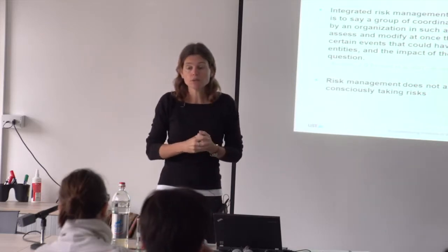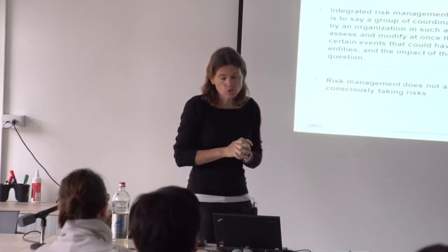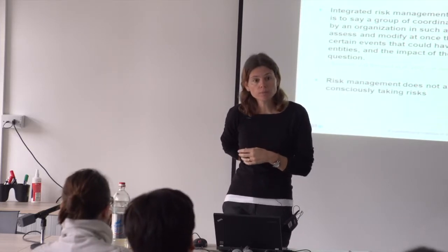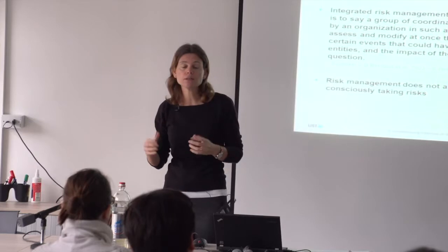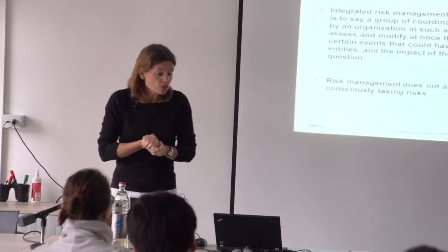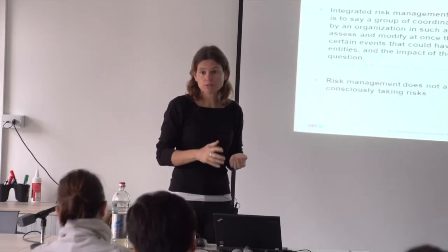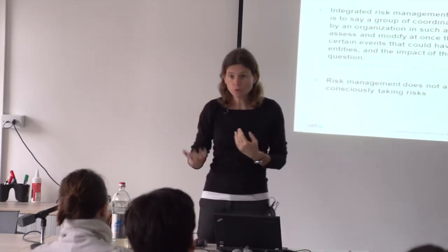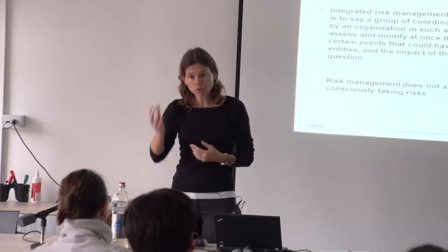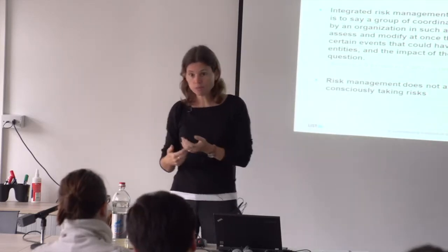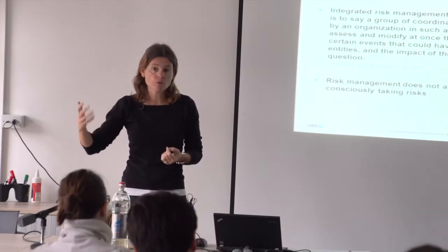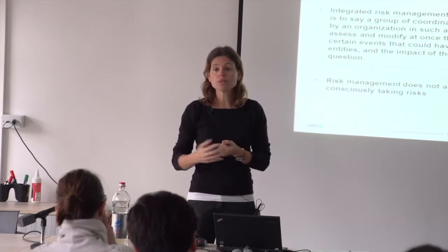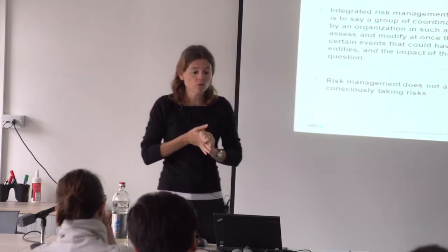Okay, so risk management, just to summarize the definition, it's all the activities that you are going to put in place and that are coordinated so that you identify the risks, you assess them, you define some mitigation actions, you follow up on these actions, you follow up also on the risks and their assessment, because along the way the project will evolve, and so the risks and their level of probability and level of impact might also evolve.